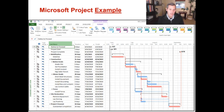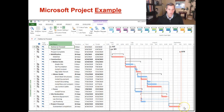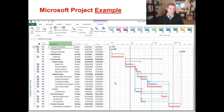Here's an example of Microsoft Project. You've got your activity on the far left, your duration for that activity next to it, the start date, the finish date, and then the visual Gantt chart to the far right showing how long each activity will take. You can see that the activities in red are the critical path — it's very visual and easy to read. You can see who is working on which activity and when they're supposed to be completed. There are hundreds of examples online; just search 'Microsoft Project Gantt chart' to see all the different options available.